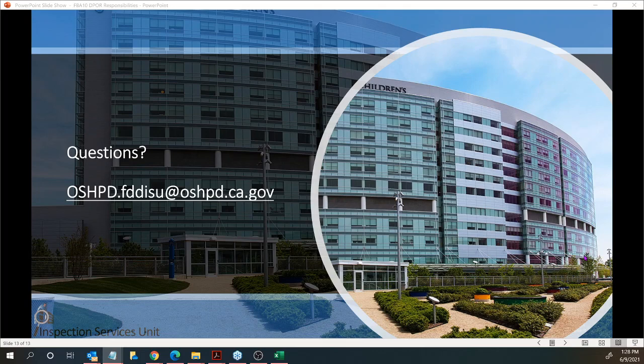To clarify, to help OSHPD review in a simple and fast way, the more you provide, the better it is. You could have, for example, the page where you're going to add the detail as a reference to say, here is where I'm going to add the other detail, because you have already filled up the page and cannot say, here, I'm adding more details in that page. So you at least give the page where you want to add the detail as a reference, and then you will have your sketch for your change order detail. And of course, one piece of advice: always complete a narrative. Explain why you're doing the additional detail. The better you explain in the narrative, the faster the review is as well.